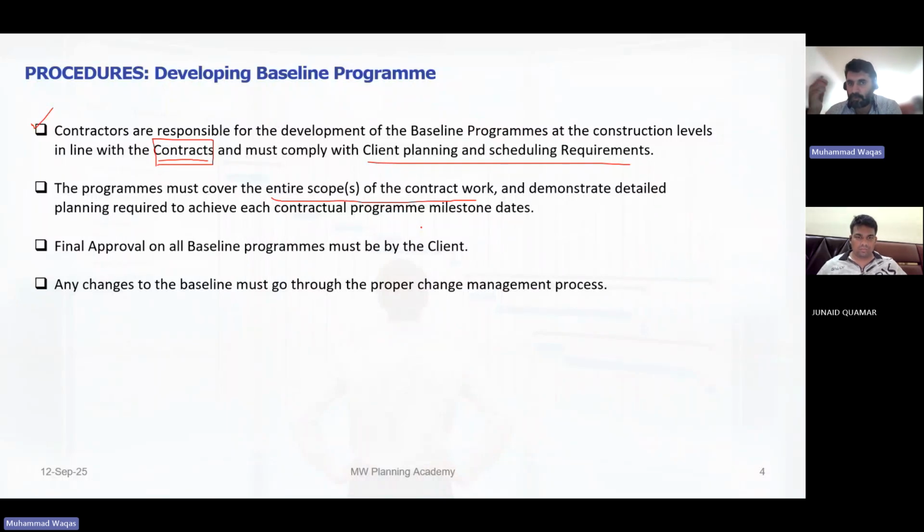So you put one line, installation of elevators, and put some duration. If somebody asks, you say this is in our scope, but at the moment we don't have the details of which floors the elevators start and finish at. It doesn't mean that if you don't have the full information, you skip it. Those also you have to include. Okay.